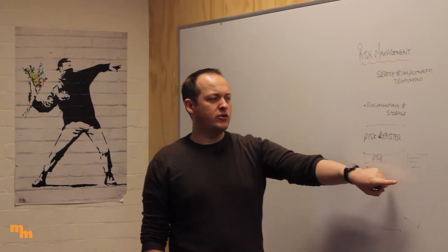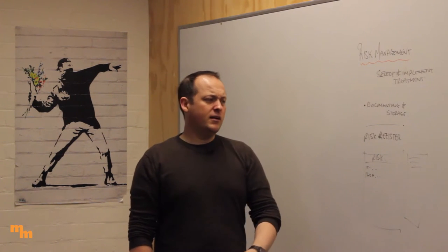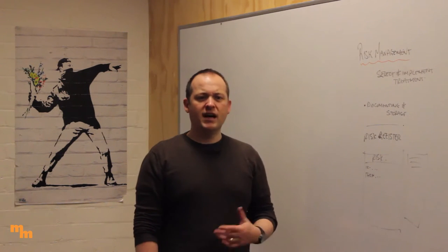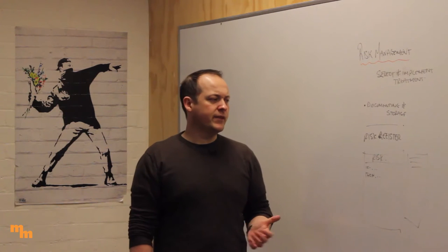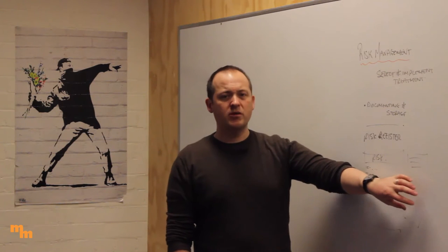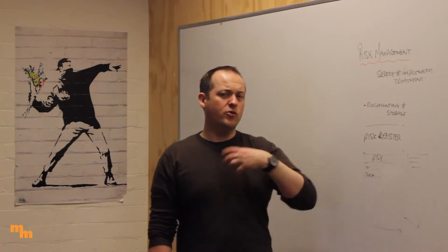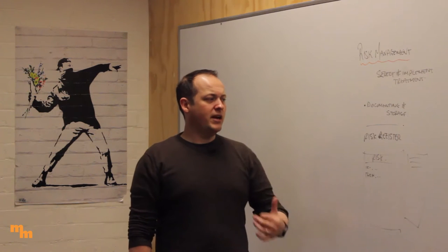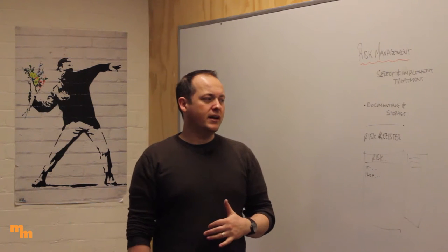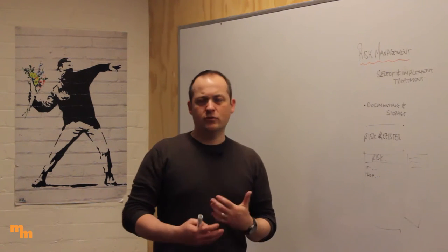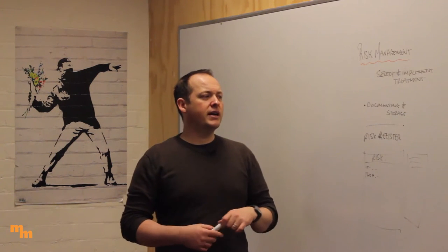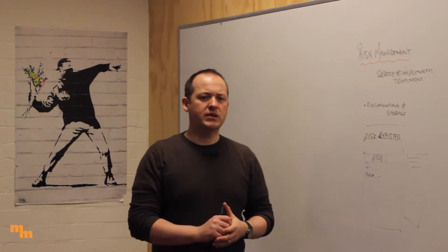We're talking about near misses or something they thought could have happened — they identified something they're concerned about. They've got a risk treatment plan so if something happens they know what to do. But all too often in business, people saw the problem, fixed the problem, but didn't report that it took place. Let them tell you what the potential impact could have been, what they thought the probability was, and the proximity — what caused it. Track the near misses in your organization and make sure you're capturing both actual incidents and near incidents, tracking them back through the register.